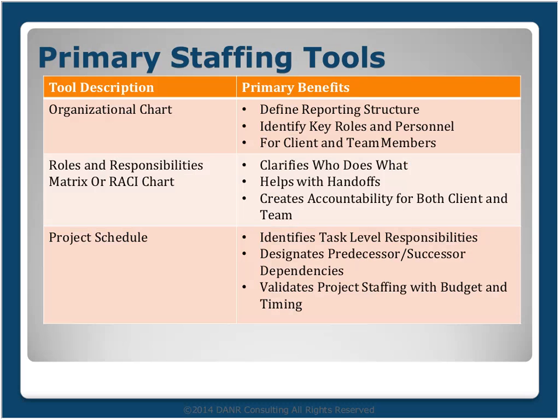When you're building a RACI or a roles and responsibilities matrix, you want to build it as part of the broader team, a broader audience. We looked a little earlier at the client organization and the external vendors. You want all of them incorporated into your roles and responsibilities matrices, because you're going to have times where you need to work with those individuals to get things done. And the third tool, which is the most granular, is the project schedule. The project schedule identifies task-level responsibilities through a work breakdown structure. It also designates predecessor and successor dependencies.